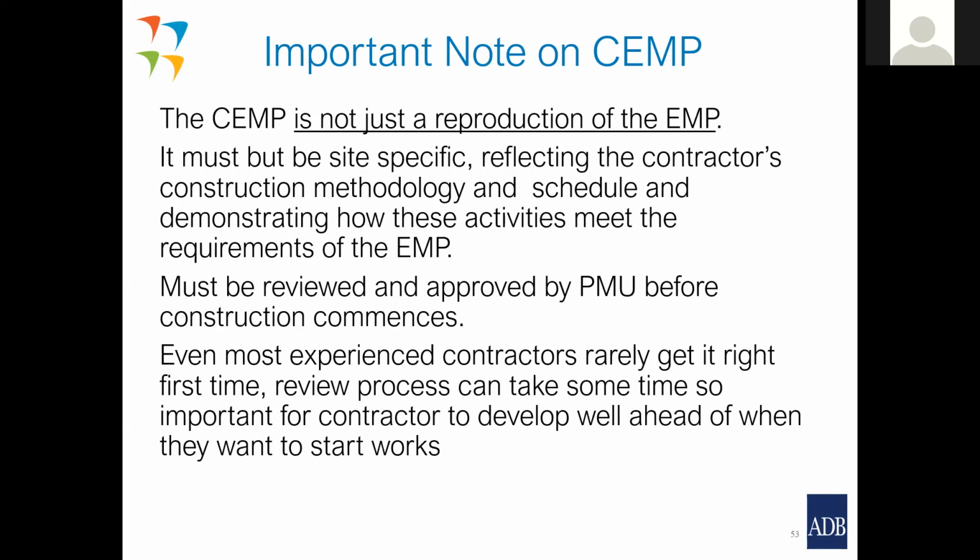And it's often an iterative process. You need to go backwards and forwards, and he'll get frustrated. But if you've got it specified very clearly in the contract document that this is what he needs to do, he should have prepared the resources to be able to go through that process. If it's not in the bidding document, if it's not in the contract document that he has to do this, then he's not going to provide the resources, and he'll get very frustrated at being asked to do that, and he'll ask for more money.